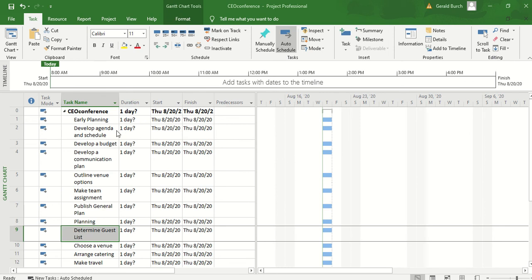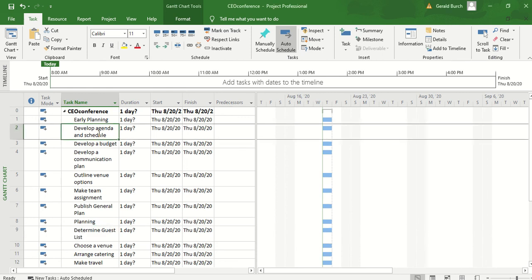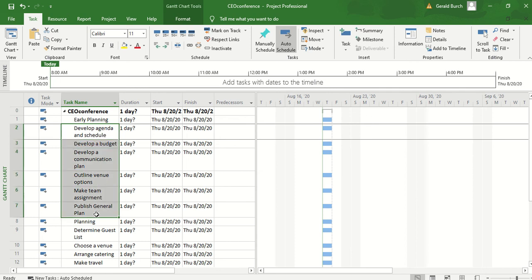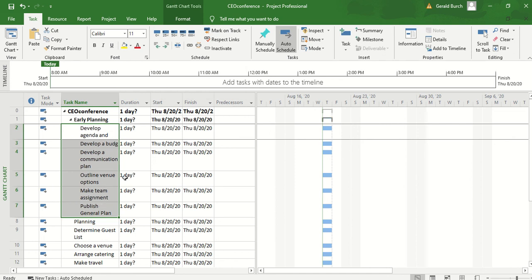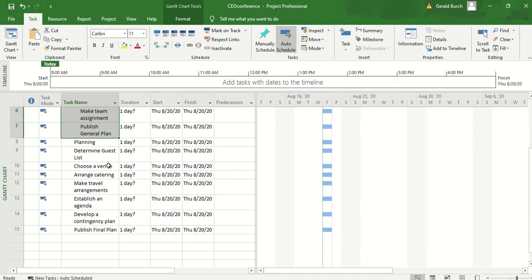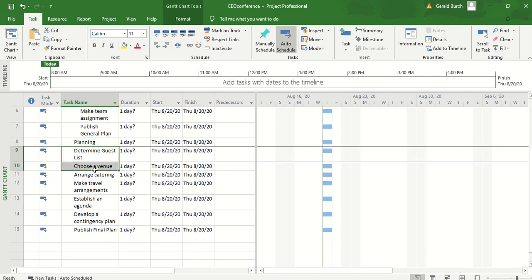You will see that during that brief break there that what I did is I went ahead and added all of the different tasks or subtasks rather for early planning. But you can see from the looks of this, you can see that early planning looks like it's indented or related to the conference center. However, all of these other tasks that really should be part of early planning all look like they're at the exact same lineup as early planning and they really should be a subset of it. So what we're going to do is highlight all of them. Go up to make sure you're on the task tab. Come over and you will see an indent task and when you indent it, you will see that all of these now are actually subtasks of early planning. Those are all there. You can do the exact same thing with the things that are in your planning section. Once again, they're all in there. Make sure you get a task and then indent these.